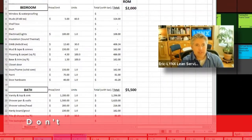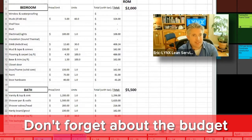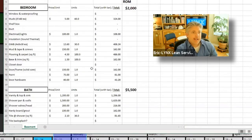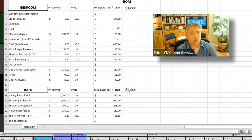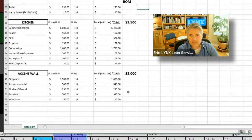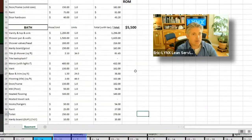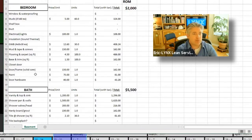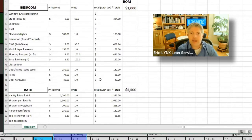The next thing we need to look at is our budget. This is primarily a rough order of magnitude, but we've gotten to a low level of detail with our budget though there are still some unknowns. We're going to be working within a $20,000 budget for the four phases of work, and right now that is right at our budget. It's a not-to-exceed number, but we will see as we learn more about the finishes and materials if we're going to be hitting that budget.